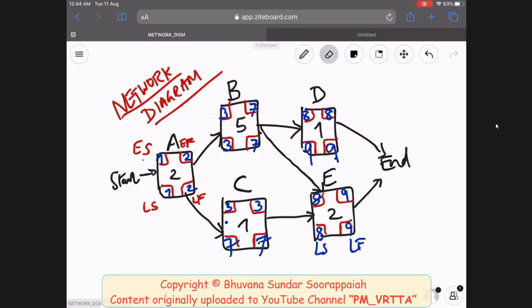I'm erasing this. Okay. So now in earned value management, you saw some things like SPI and CPI. Imagine a scenario where SPI is less than 1, CPI is greater than 1. It means your project is behind schedule and under budget. You have saved some money. So you can use that money to put in more resources to the critical path activities, so to bring the project back on schedule. So you have more money saved. That's why your CPI is greater than 1.